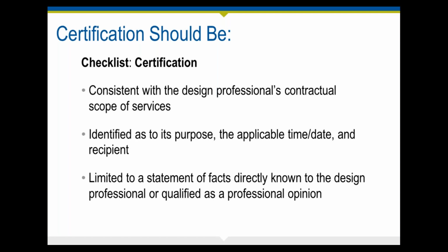Or you can qualify it as a professional opinion. Based on the services that I have provided, it is my opinion that this facility meets the requirements as stated in this code section. That is qualified as a professional opinion based on the services that you've provided. That is certainly an acceptable way of handling it. That's the way you should think about any time you're being asked to provide a certification by the client. And always feel free to amend the forms that have been provided to you and make sure that it makes sense and that you're comfortable with providing that type of certification.